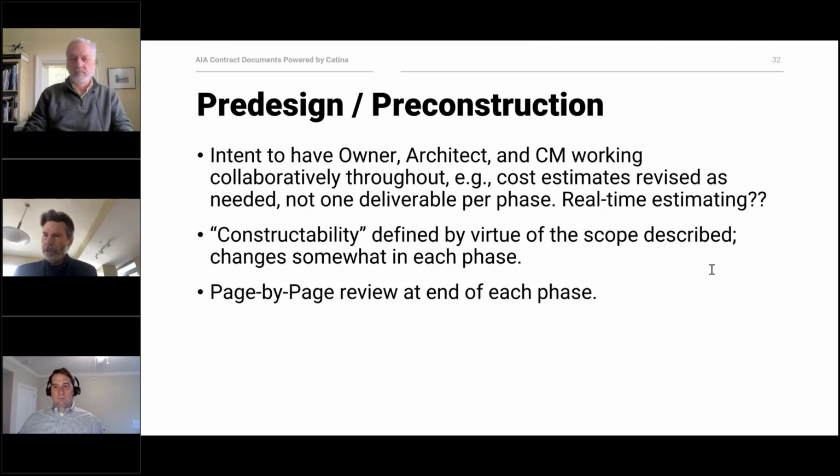One is to give a running account of how the costs are being affected by the design process, but also the principal effort is to make sure that there are no surprises. At the end of the day, contractual arrangements depend largely on the parties' expectations of what their contractual arrangements are to provide them. And so the more that parties communicate, the more that those expectations are realistic and in line with one another.